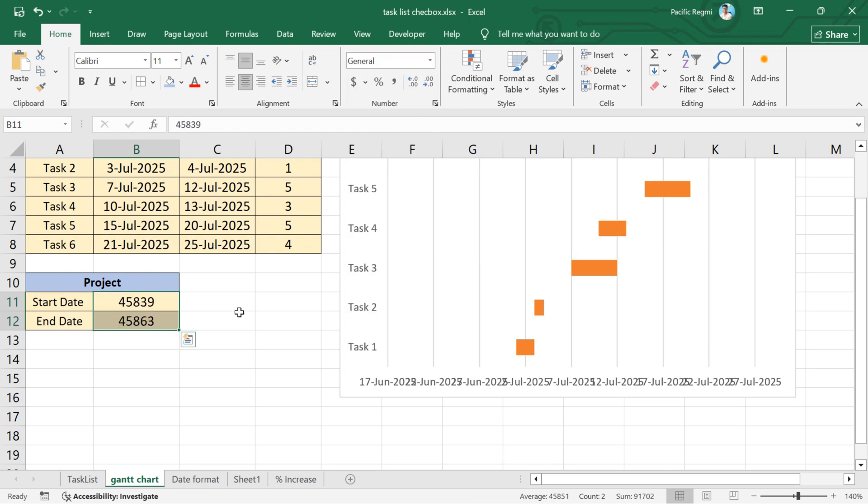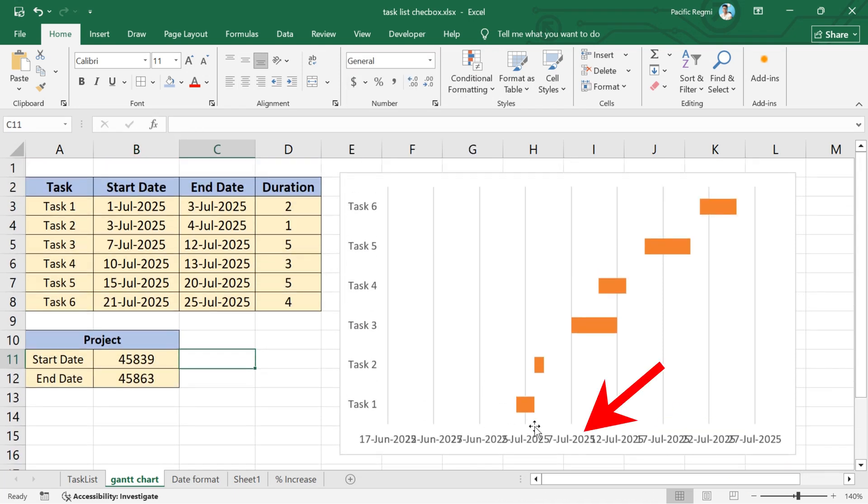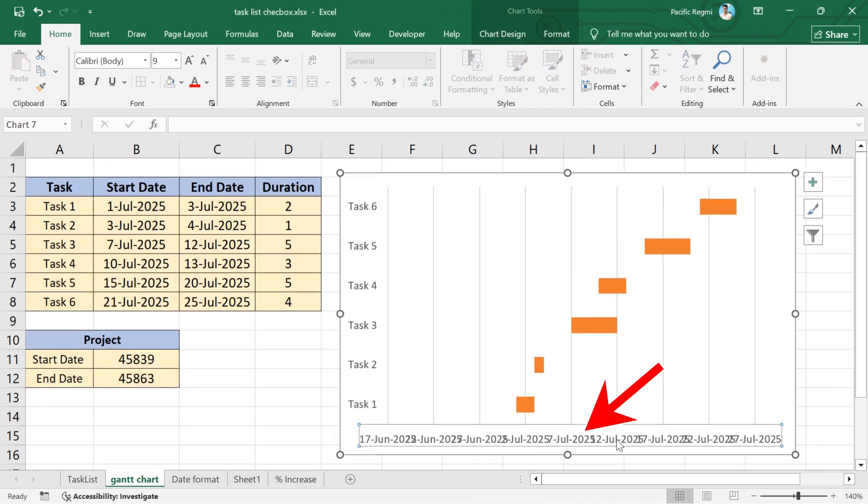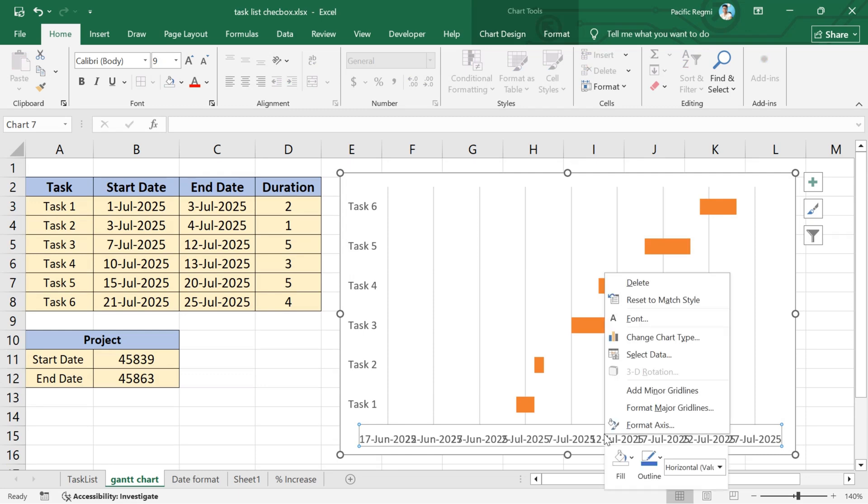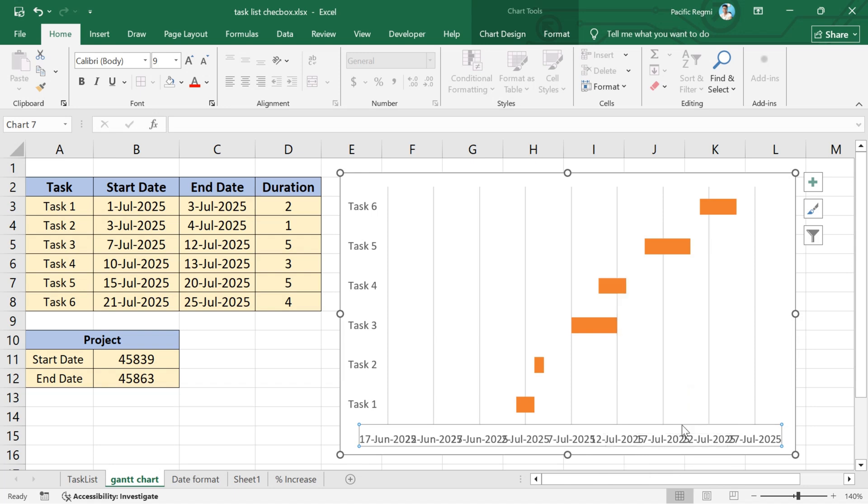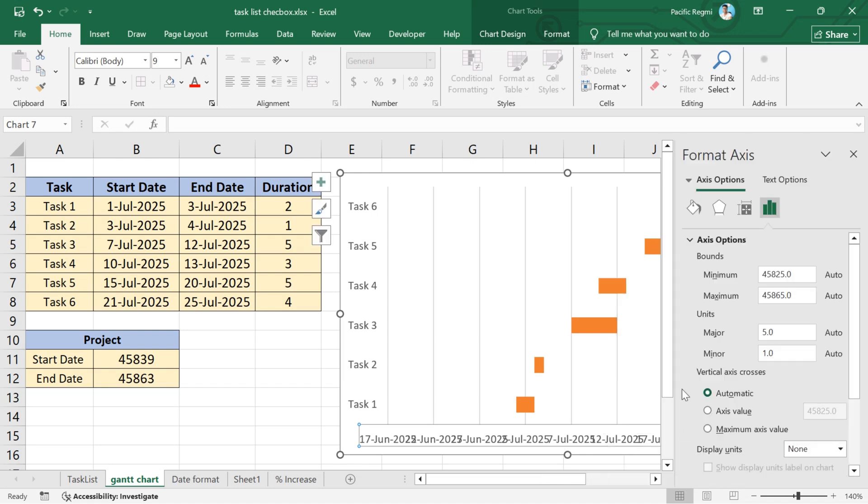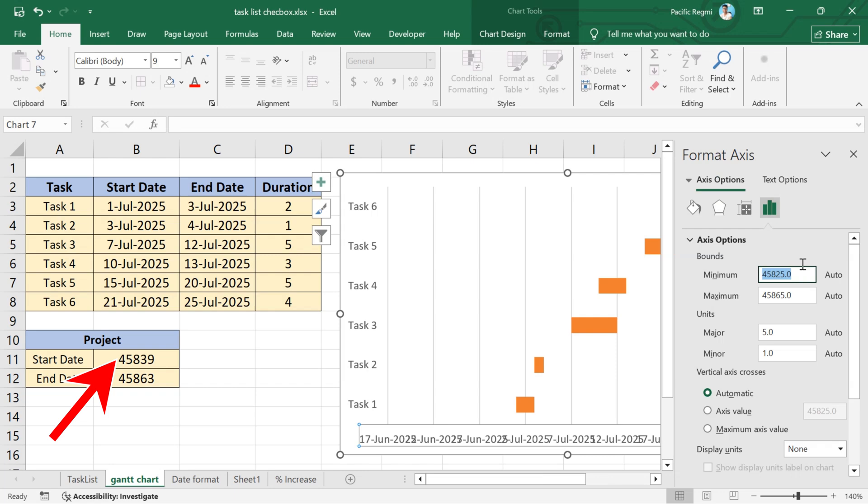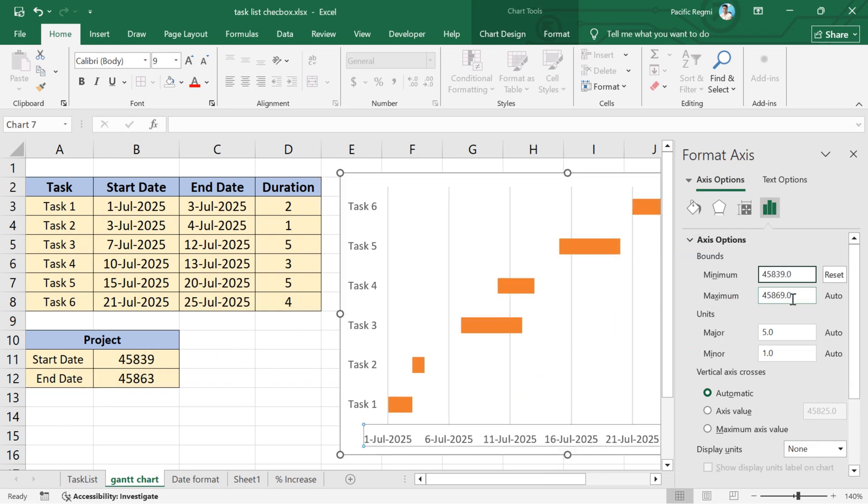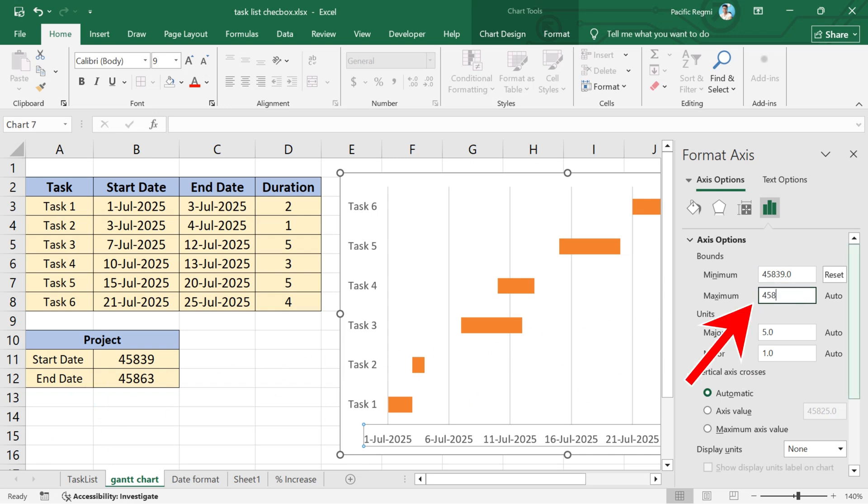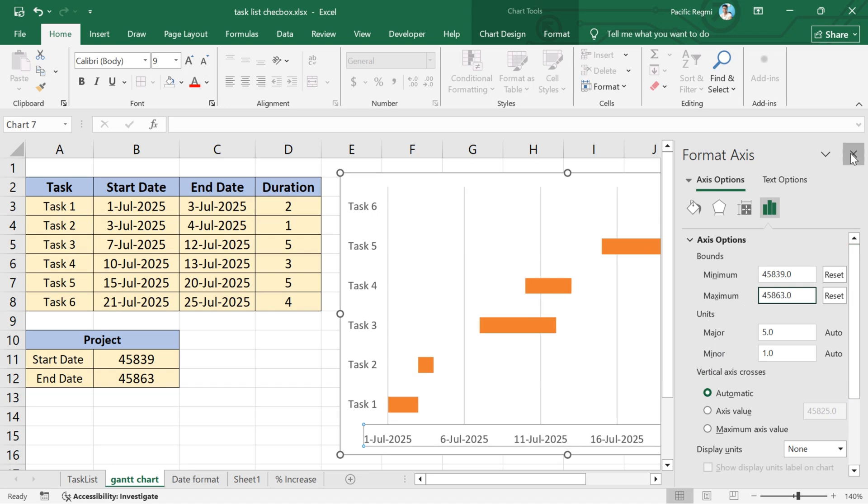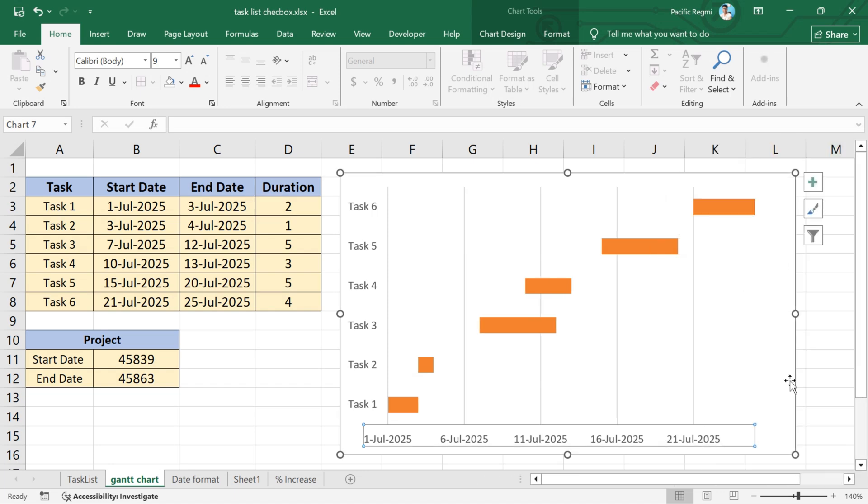Now, go to the stacked bar and select the dates, then right-click on them. A pop-up menu appears. From here, click on format axis. Under axis options, set the minimum value to this start date value and press enter. Now, in the maximum value, set this to the end date value and press enter. Date labels are now fixed.